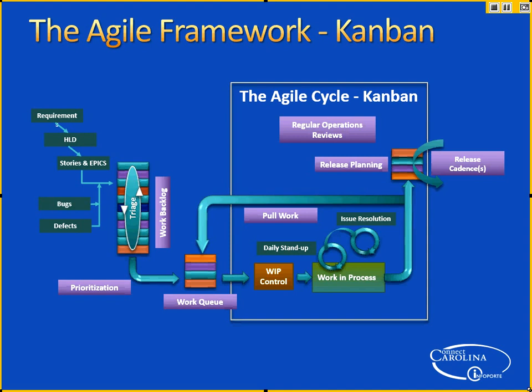And we talked about last time that ultimately the experience, at least to date, suggests that a best case work in process is like 1 or 2 pieces of work, cards or whatever, per person on the team. But you don't start there. You start with a lot higher, because we know we don't have a finely tuned process, and we're going to run into bumps and stops a lot more often early. So you want to make sure that the person who stopped has something right now to pick up and move on with. Right? But then as you smooth the process, the tighter you make the work in process, the higher the team goes.